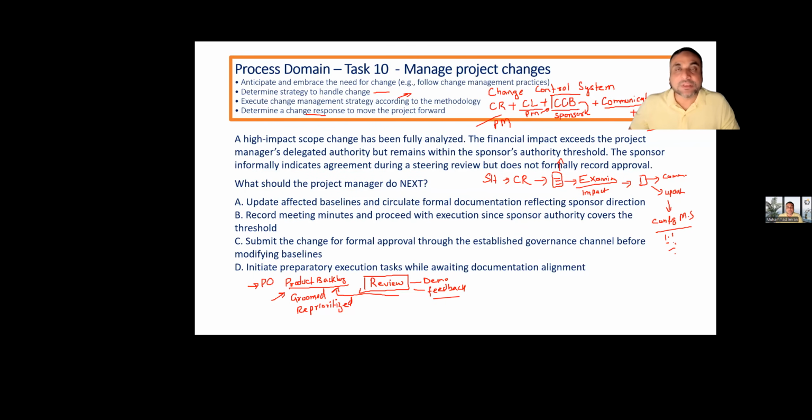And the last one is hybrid, which is more confusing for many people. How do you make changes in hybrid? So we know in hybrid, project manager and product owner are working. The project manager is actually leading the product owner based upon the authority again. Ideally, the project manager is leading the product owner, and the product owner is leading the teams to deliver the unknown part of the project, while the project manager is working with another team to deliver the known part of the project.